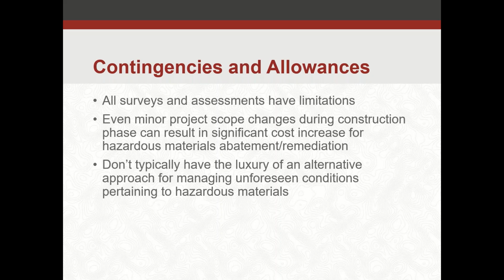You're going to run into some unknown conditions. If you don't, great, you can put that money towards something else, but definitely plan for it because there's a strong likelihood there might be something that you've got to spend that money on.